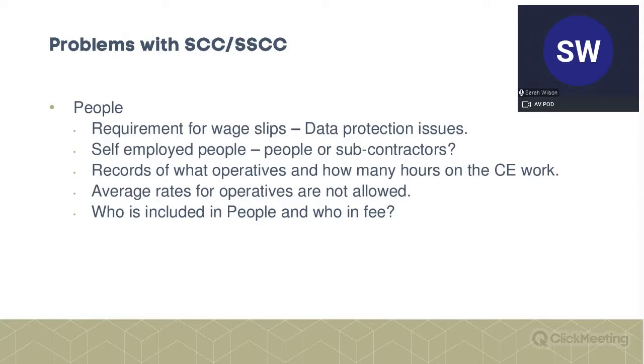It's for individuals, remember. So there's a requirement for pay slips, which is not particularly attractive for data protection issues. It's still compliant because you have a reason for disclosing pay slips, but people are fairly sensitive about that. So what I would say is, if you have the chance, put rates in, but just be really careful about putting rates in. But it avoids this requirement to provide all this information.